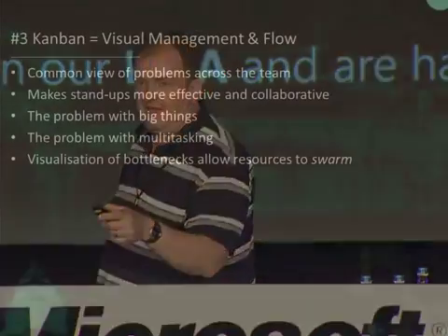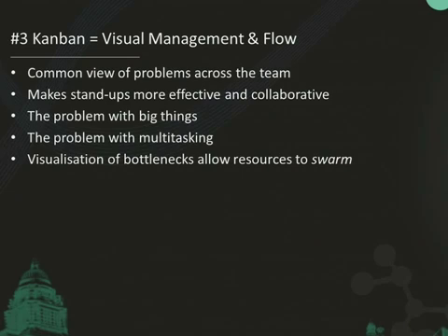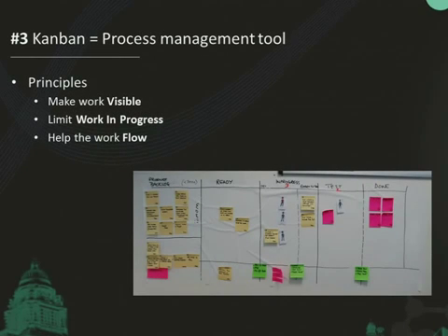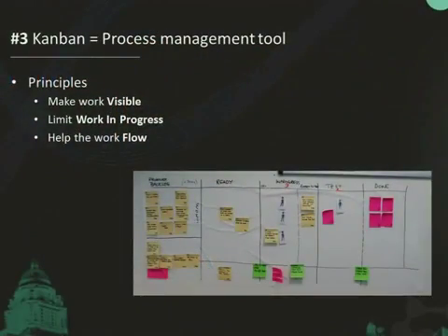But in Kanban, they work differently. You don't go around each person saying, what did you do yesterday? You tend to look at the work. If I go back to the last slide, you start at the right-hand side, which is the done end, and you work back from right to left, and you discuss the actual work rather than the people, which is a subtle but important difference. You see stand-ups moving a lot quicker, and you can typically have them with a lot more people than a Scrum stand-up.